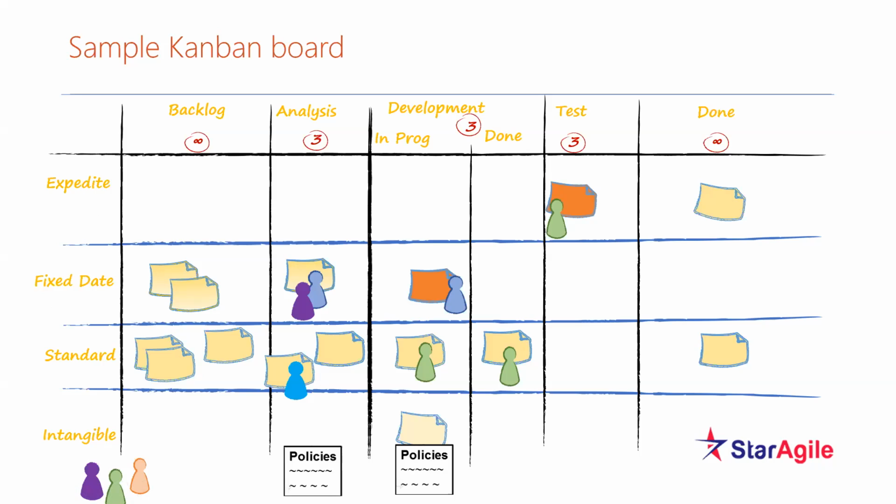So if a couple of people may be working on a project, where you guys are working on a user story, and suddenly there is a defect from production. What will you guys do? Will you say, no, I have been assigned a user story and I will do that later? No, production defect takes more priority. So we will put that in an expedite lane.